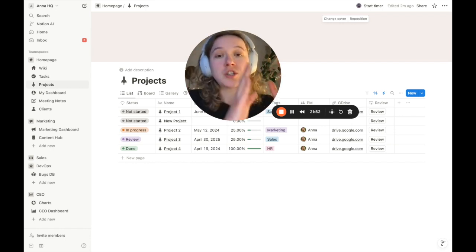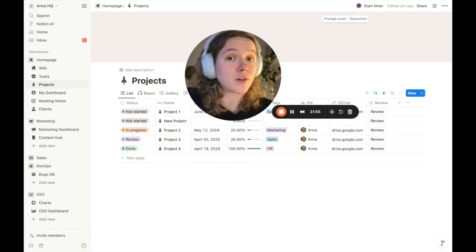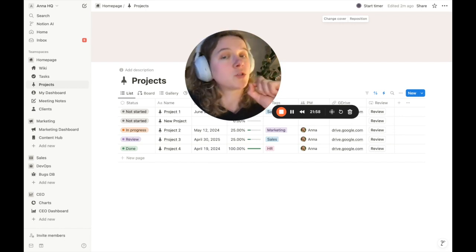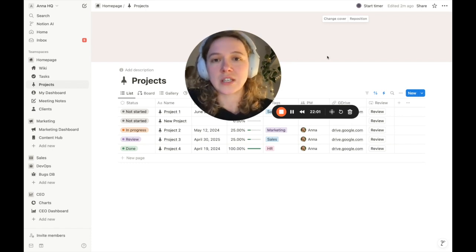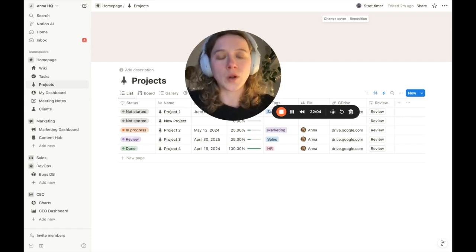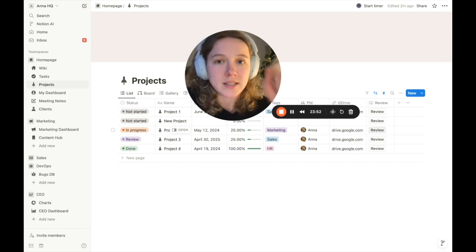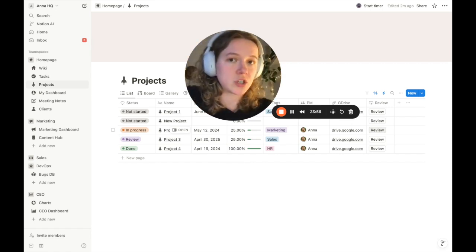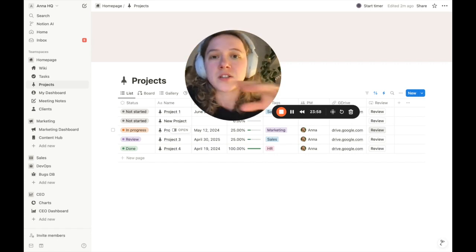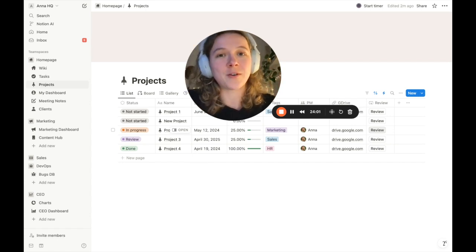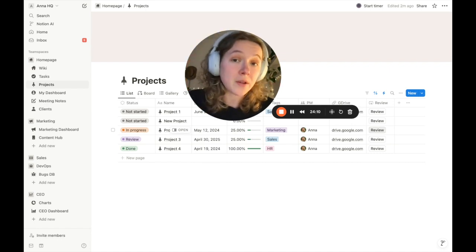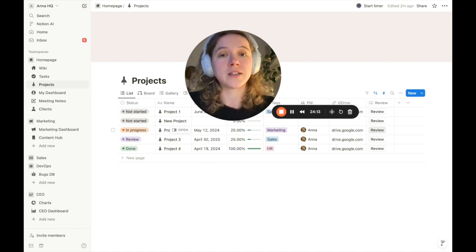So every time that we change the stage of a project, we can notify a specific person of our team. We can even send a specific email to a specific client, or we can just get notifications inside the workspace so everyone is aware of what they need to do every single time. And we can even go as far as using buttons inside our system to trigger these automations, to be like, set this project as in review status. And then that's going to change the status, that's going to notify your boss, and maybe that's going to create a few new tasks. So this is just the final message that Notion automations are super useful. And there are so many ways that you can optimize your systems so your team can work more efficiently. You can have everything under control while keeping all the operations for your business on the same side.